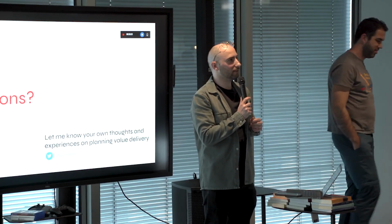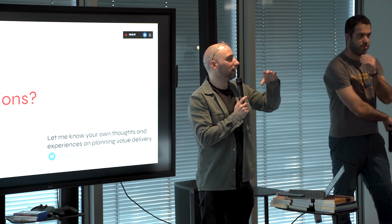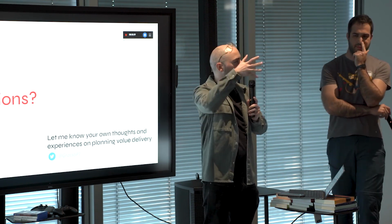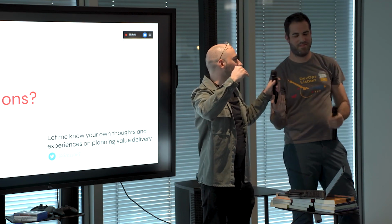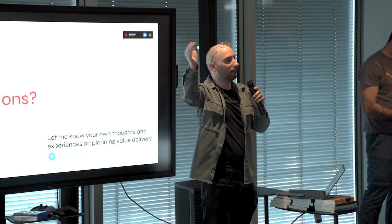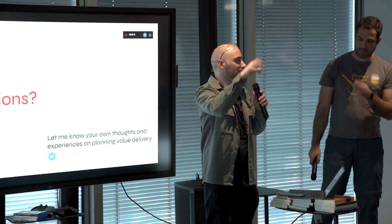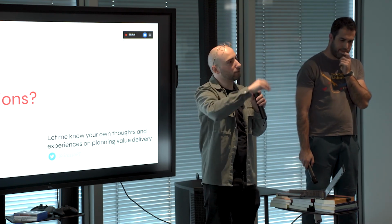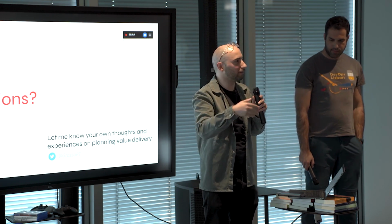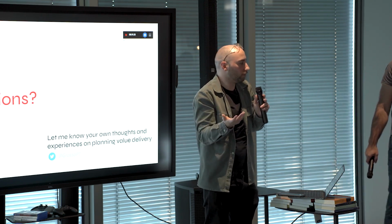How do you handle project work, service tasks, all in one work? So that is one of the cool things, which is if we have things being measured, like I told about the semaphore, we can also look at the toil work and how bad it is and point it out. Here we are having this number of requests per week, and we want to decrease this because this was in these areas, these assets that are really bad. And if we fix that, we'll have a lot more time. We might not need to have one person dedicated the whole time. We might actually save a lot of time that is measurable this way.